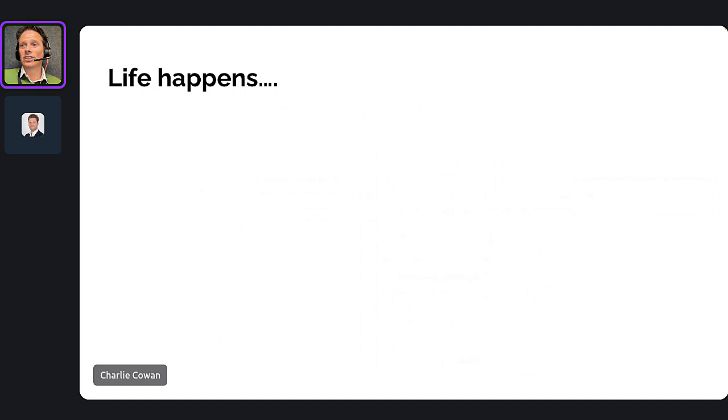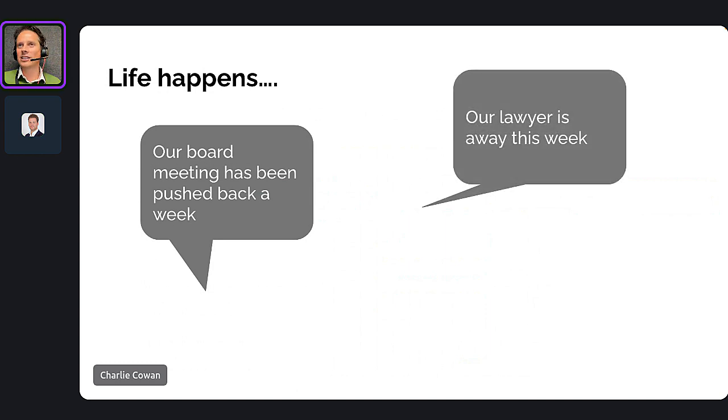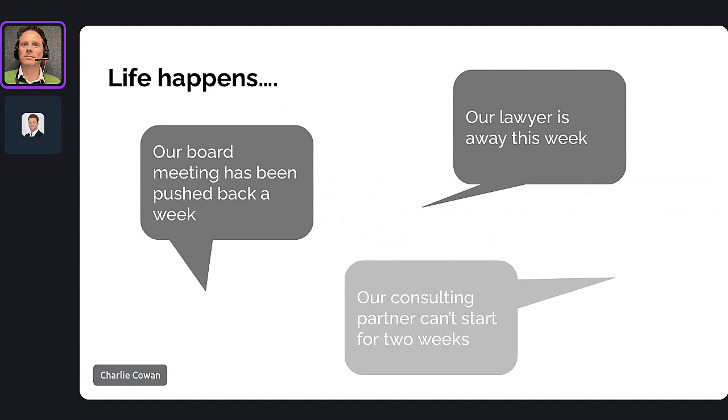And that's important because, as you will know as a seller, life happens. "Sorry, Charlie, our board meeting's been pushed back a week." Well, that changes things. "Our lawyer is away this week." That changes things. "Our consulting partners told us they can't resource the project. They can't start for another 2 weeks." That changes things. These what-ifs are so important in terms of taking a static plan and a list of activities into something that's dynamic and is actually helping to guide your customer forwards.